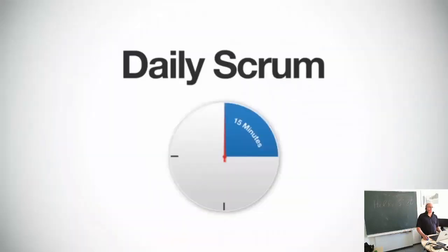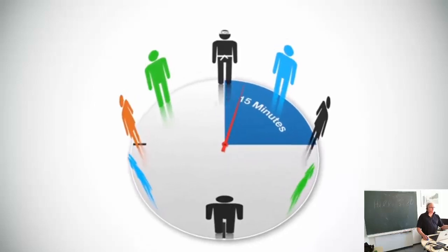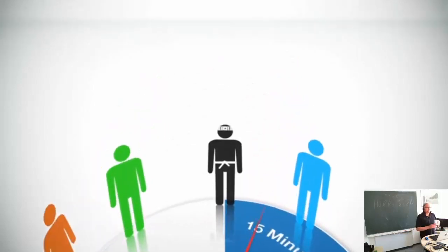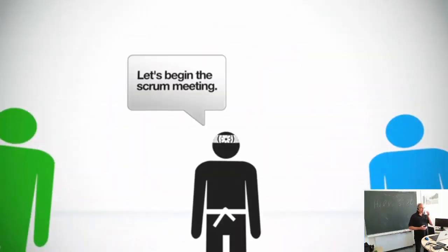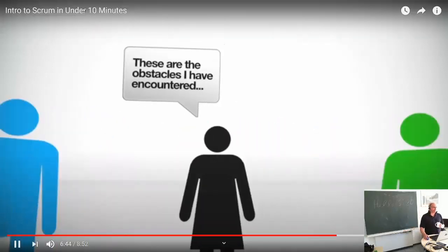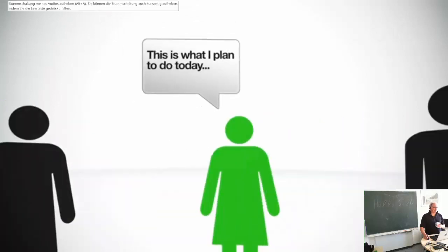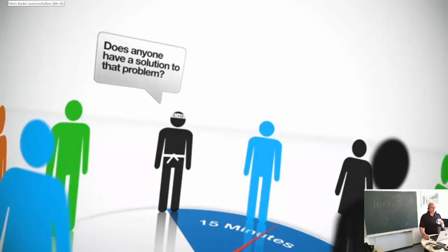And that brings us to the daily Scrum. The daily Scrum is an essential tool for having communication flow freely between team members. The idea is to have fast-paced stand-up meetings where team members quickly list the work they have completed since the last meeting and any obstacles in their way. By meeting daily, it ensures the team is always in sync and any major issues are dealt with as soon as they are known.